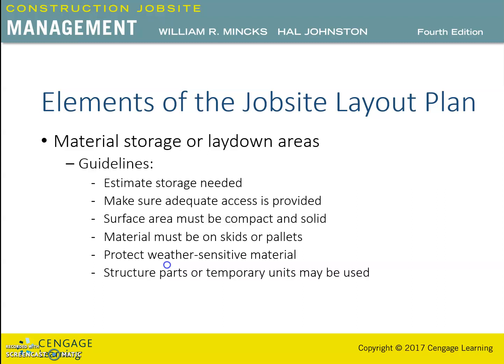Parts of the structure may be used for storage of materials. Storage within the structure is always limited, thus the material stored in the buildings should be that which will be used in the particular area, that which is weather sensitive, and that which requires high security.